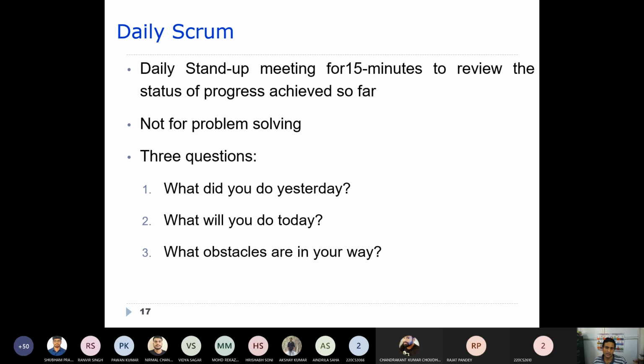I mean, what is it that you did yesterday? What are you going to do today? As well as if at all there are any obstacles or problems in between that disturb or prevent you from achieving whatever you planned. This sort of thing will be answered by each and every member quickly. So that is why it only lasts for 15 minutes.